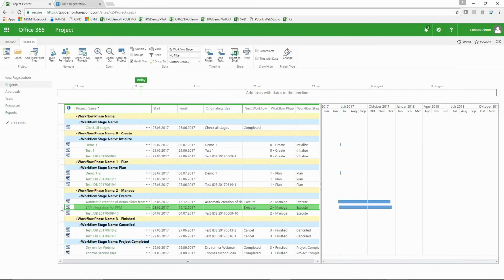From wherever you want to control the state change and the phase stage of the project, we know that all this is possible in Project Server as well. No problem, no doubt about it. But it really depends on the size and complexity of the workflows and how much governance you want to build into it. You can make the K2 side of the workflow check preconditions and intermediate results, whether the deliverables are there for the specific gate, and only then would it be possible to finally execute the project lifecycle.